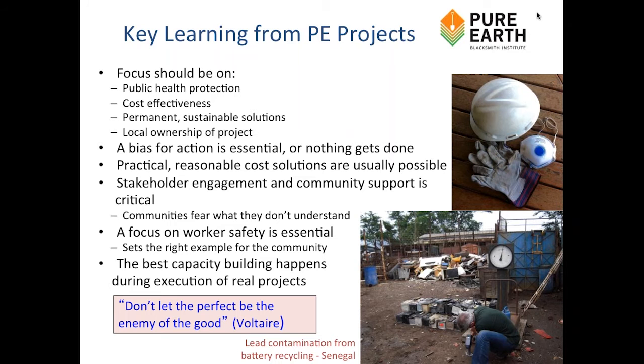Said this is meeting your standard because the soil that people will be exposed to will be below a very low standard. But so that's the basic answer. Follow the national standard. If it's really, really low, have a discussion, and recognize that when you're covering material, the people are exposed to the soil on the top. As long as that meets the very low standard, hopefully you can have a successful discussion with the government. Okay, thank you.